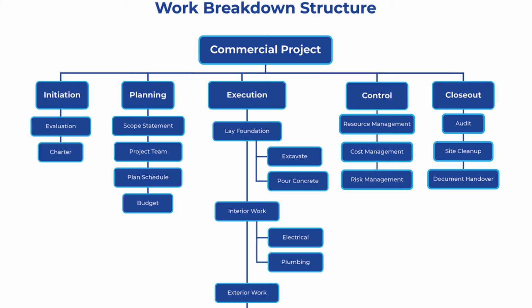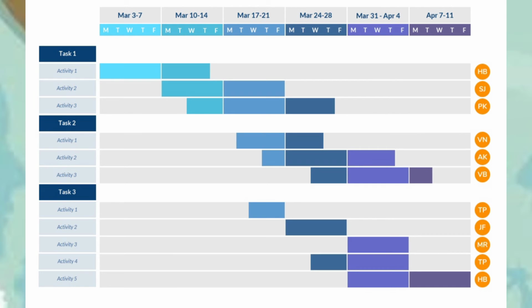For this, we use the horizontal time chart called the Gantt chart. The Gantt chart is just a vertical view of a WBS with a horizontal time next to it. Each activity and deliverable is presented by a bar, so you can see when it begins and when it ends, and you can also see the activities that are occurring at a given time.